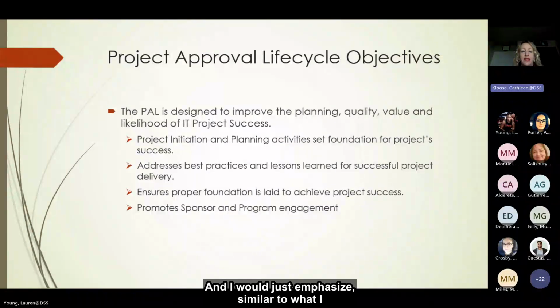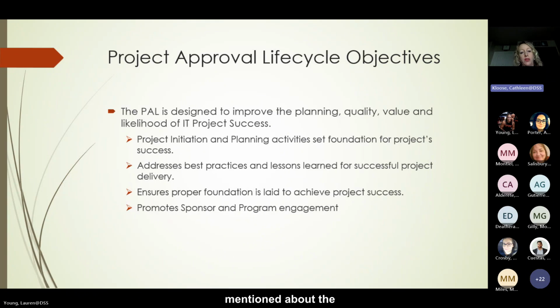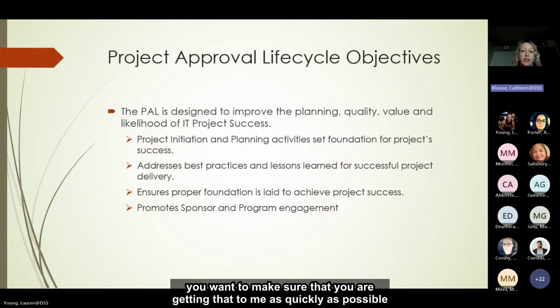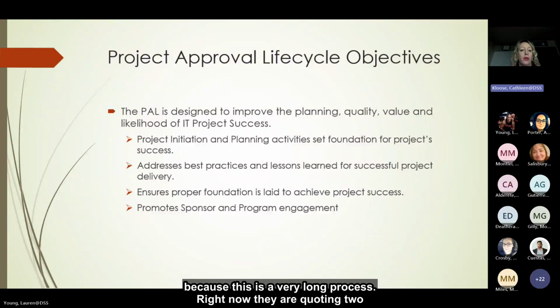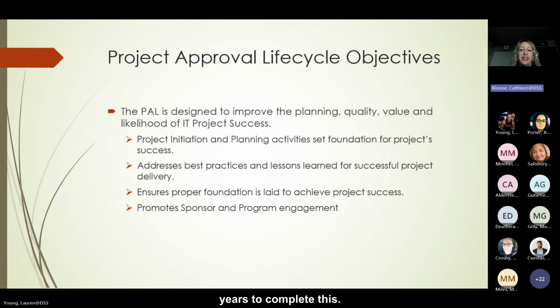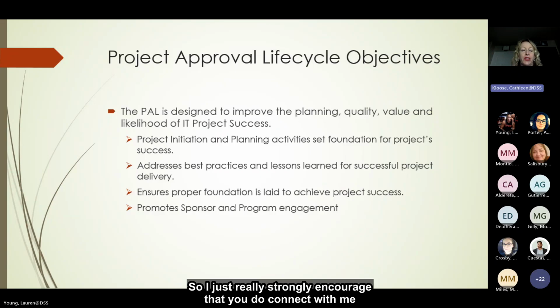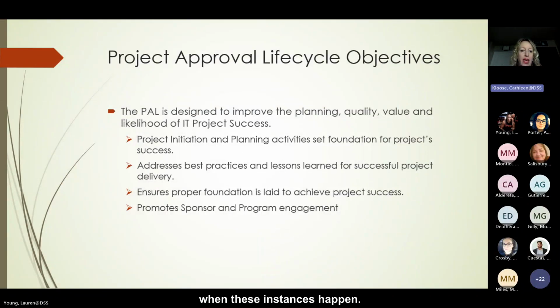And I would just emphasize, similar to what I mentioned about the importance of identifying these IT contracts. If it is a new contract and it does warrant the PAL process, you want to make sure that you're getting that to me as quickly as possible, because this is a very long process. Like right now, they're quoting 2 years to complete this. So I just really strongly encourage that you do connect with me when these instances happen.